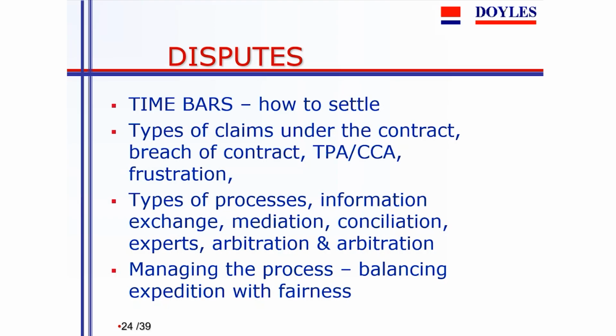Whenever you've got a claim that isn't accepted, you should try the security of payments, because it will mean that everyone concentrates on the matter, everyone has to put their best case forward, and oftentimes there's the potential for settlement of things that wouldn't otherwise occur. So look at disputes when you look to evaluate contract to make sure that it provides for a sensible way of resolving outcomes. So we go to the next slide.